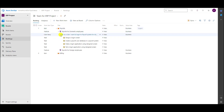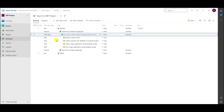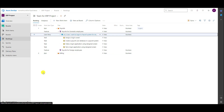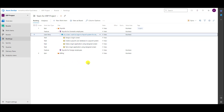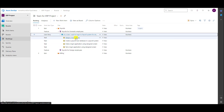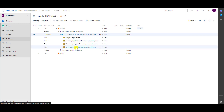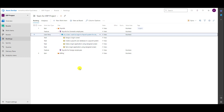If I click on this feature I will see stories under features, and then tasks. For this user story I have: design login screen task, create a payroll user database in a payroll system, make a login application using design screen, and test the login application using design screen. The login application can be done after design a login screen is done and the database is created, and test the login application can be done after make a login application is done.